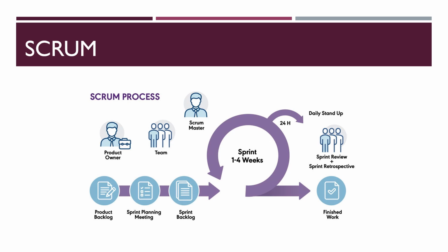The full life cycle test is carried out here. After the testing, each sprint is demonstrated to the user, and the last phase is the retrospective. Retrospective is where the team discusses what went well and what can be improved in the next iteration, and the lessons learned after each sprint. After that, the next sprint is planned and the cycle begins again. This is how the Scrum process works.